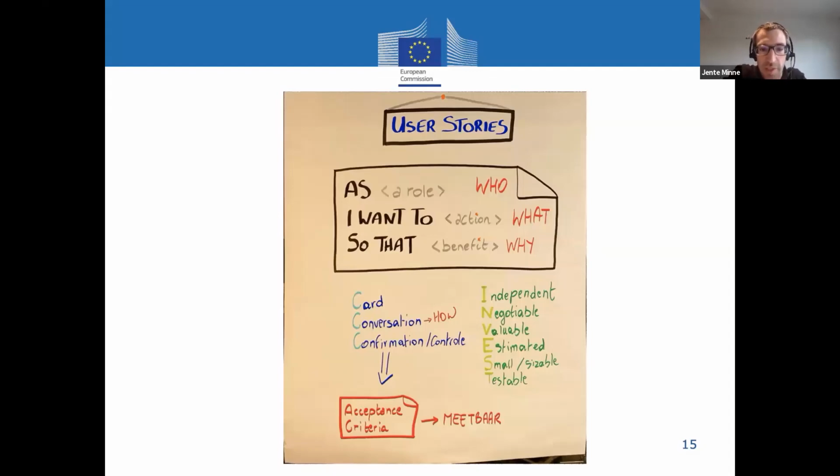When you go further within the user stories, you have a little card. The idea is that your user story is not too big, but fits on a card, and you will define more, because with this phrase on its own, the developers won't know what they have to do. You can write a lot on it, but the idea is that the development team talks with the person who has written down this user story, and they go into more detail on the topic. So rather than making a full description of pages in one specification, the conversation is very important. The developers will give ideas, and the business side will give ideas, and that's how you come to an agreement on what we want to do.